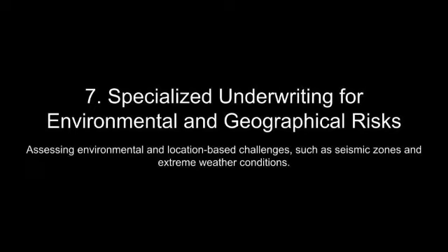Underwriters must consider these indicators within the broader context of the project, recognizing that short-term fluctuations may not necessarily indicate systemic problems. For instance, a temporary dip in SPI may be recoverable if the contractor demonstrates the ability to reallocate resources effectively or implement corrective actions.